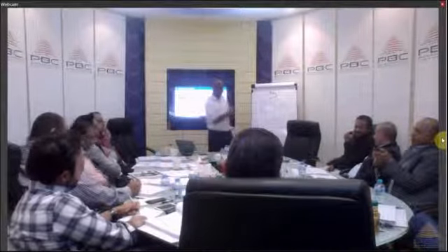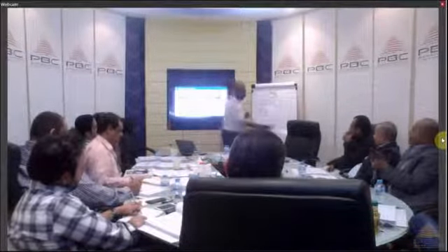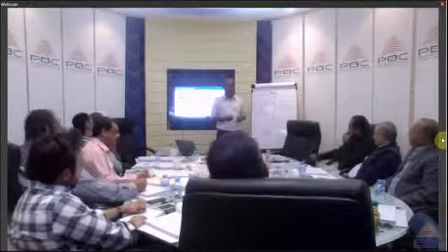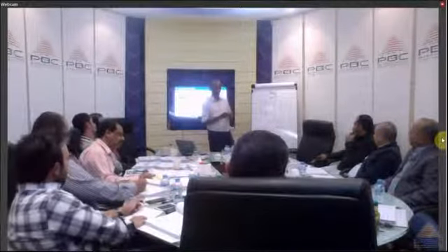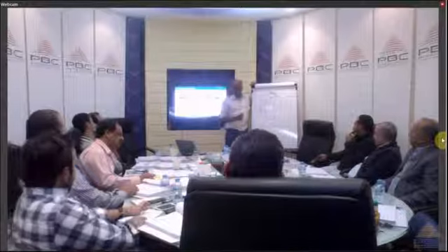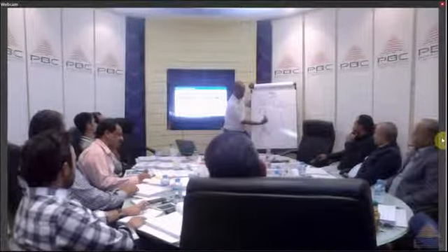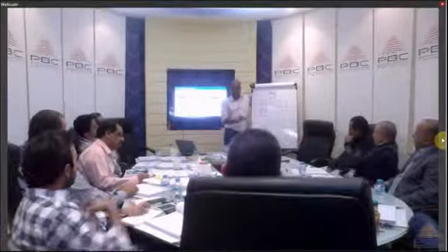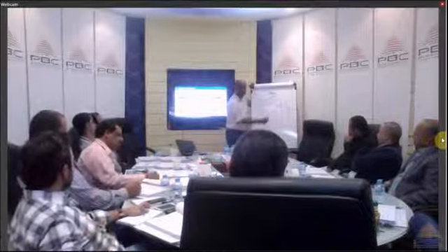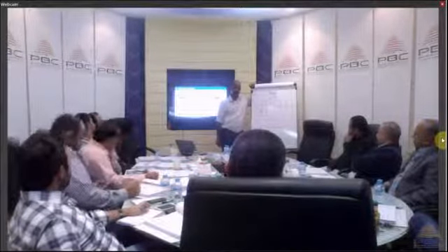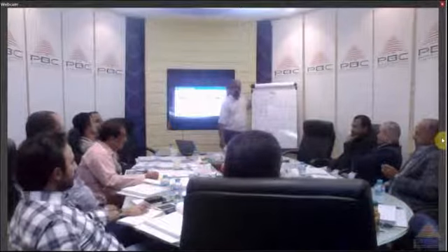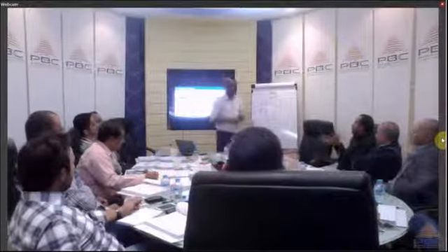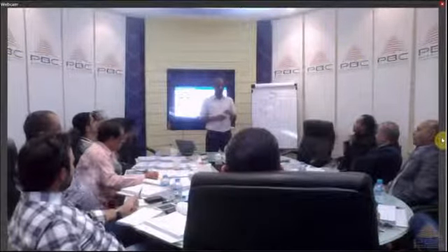Okay, so lead. If this takes 5 weeks and this takes 9 weeks, if we have a lead of 2 weeks, how long will we take to finish this? 12 weeks, because we start 2 weeks before A finishes and we gain 2 weeks. So instead of 14 weeks, it becomes 12 weeks. So lead. Now, can we always do this? Sometimes, depending on what? The duration of the activity. You can make the structure and then make the robot.